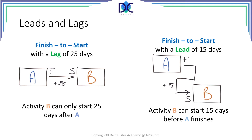Another term is a lead. A lead can be explained as a negative lag. When we have activities A and B, B can start 15 days earlier than the finish of activity A. An example would be that for completing task B, you may need some equipment to order and there is a delivery time. That delivery time would be the lead you apply to task B; otherwise, you will never have the equipment on time. Precedences, leads, and lags are very important terms for a project manager.